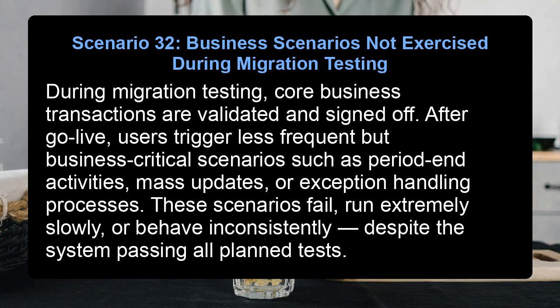Scenario 32. Business scenarios not exercised during migration testing. During migration testing, core business transactions are validated and signed off. After go-live, users trigger less frequent but business-critical scenarios such as period-end activities, mass updates, or exception handling processes.